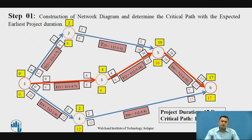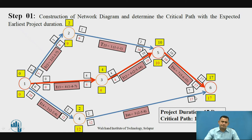Here the activity times and event times are mentioned with the expected time of each activity. When we observe this slide, we get the critical path as 1, 3, 5, and 6, and the overall project duration is 17 days.